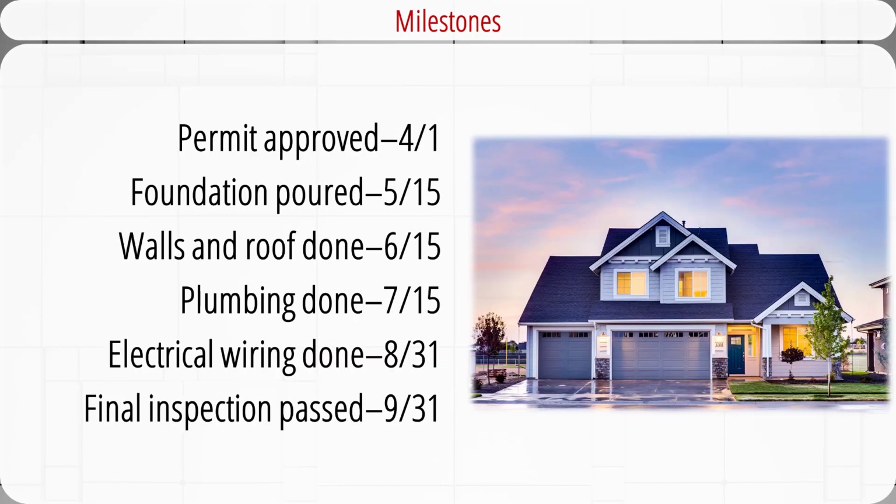Some stakeholders, such as top management or regulatory agencies, often neither need nor desire a detailed project progress report. They will be satisfied with project progress toward major milestones. Milestones are significant project events that mark major accomplishments. Note that project milestones are events, not tasks. It's a time instant, not a duration.